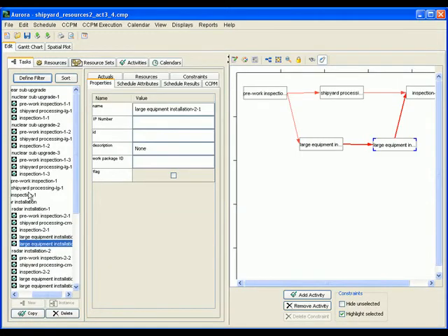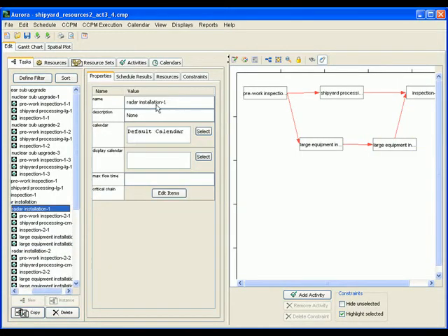And that would indicate that overall there is sort of a standard project schedule, if you will. Those three calendar sources are cross-referenced in the scheduling process to make sure that things only schedule when the full calendar indicates they can.